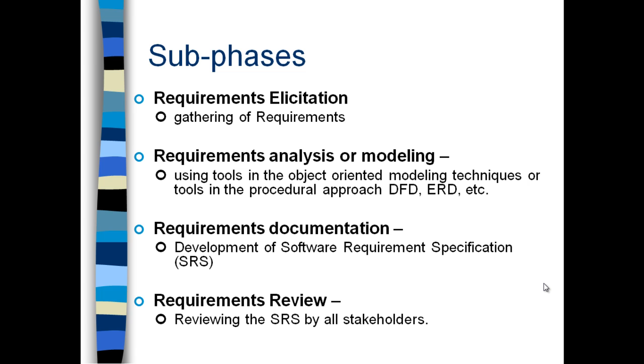Another piece of advice is you don't need to complete one sub-phase to start the other phase. These two things could be started in parallel. The other one is also important, requirement documentation. All these things don't make any sense if there is no SRS, software requirement specification. That's what you actually need to prepare in order to get the agreement with your client.